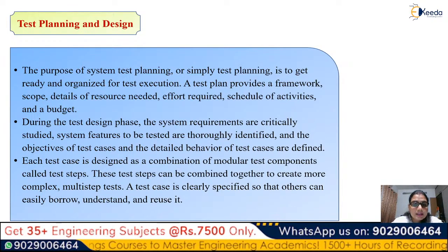So a test plan provides you a framework. It provides you a scope, what to test, then details of the resources needed, what kind of resources you require, then effort, that means how many people will be involved and how many of them will do their job in this particular kind of testing. So if I say unit test people, 5 unit test people, 10 system testing people, and so on.